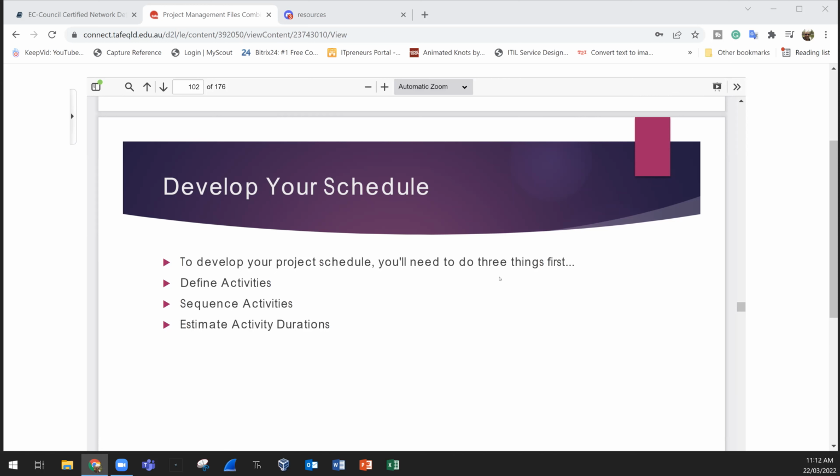How can I sequence these activities? Can I do some activities in parallel? What must be done in the beginning? For example, if I'm painting the wall, I can't immediately hang pictures because I need to wait until the paint dries. So this will take some time. I need to calculate this time and put it in the duration, so I can estimate the activity duration.